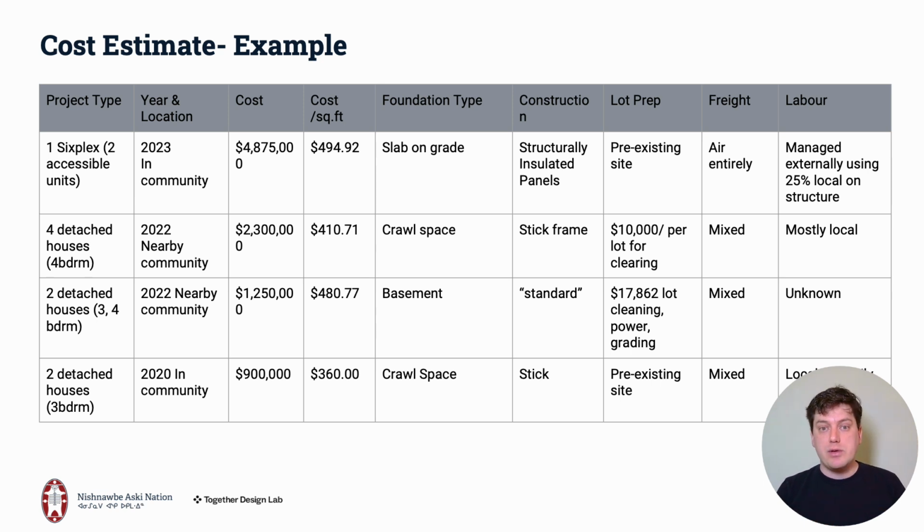And what you can learn about them might also depend on the type of project that you're undertaking. For example, if your community is looking at building a project with some panels, like modular construction, for the first time, it might be super relevant for you to look at other communities who have used that technology to see how their costs compare to what you've been seeing in the past in stick frame construction, if that's what your community is more used to doing.